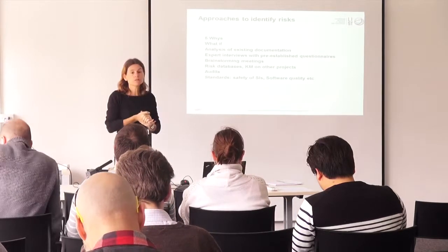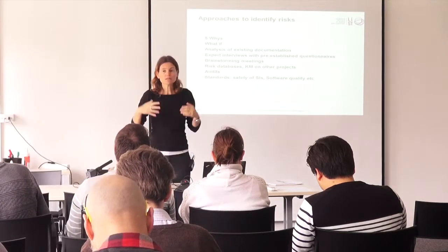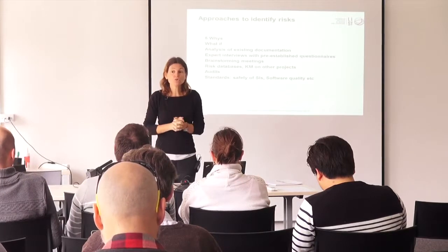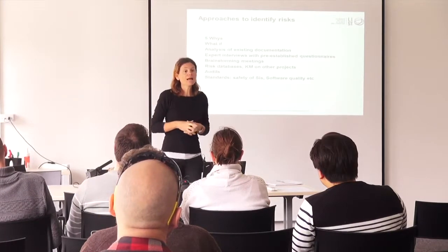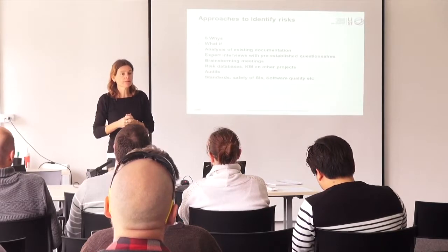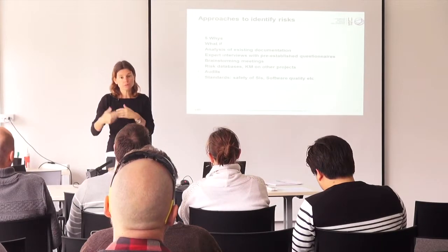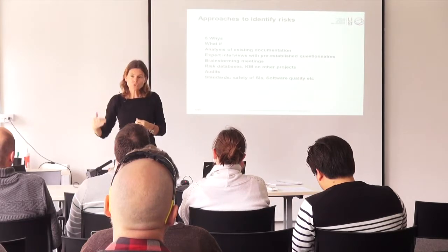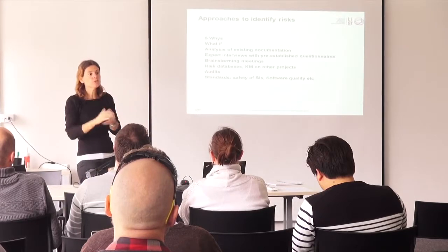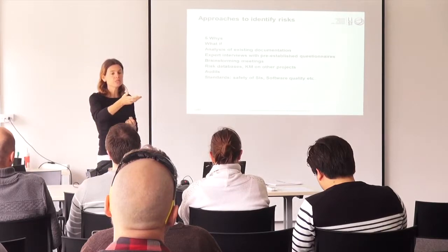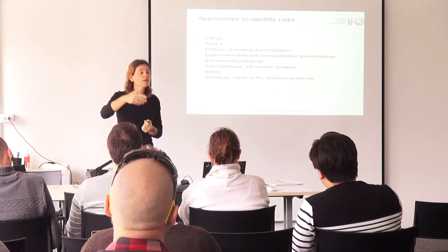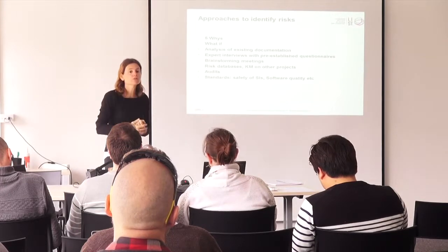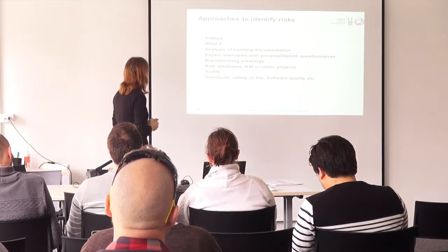The 5 whys is trying to understand, asking some people, why do you think this project could go wrong? And why do you think it could go wrong in that case? And why would be the source? And 5 times you will ask the question, so that you go down to the root cause of that situation. That was the first statement you said, asking the first why. And so you try to treat that root cause instead of treating just the symptom that you have.